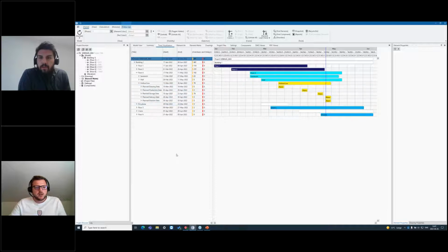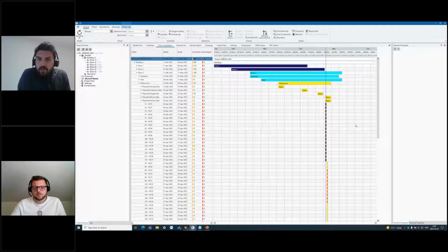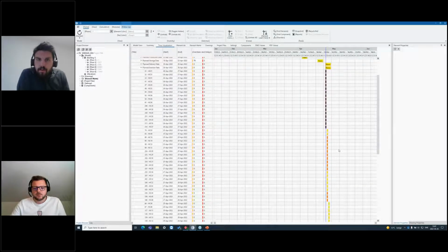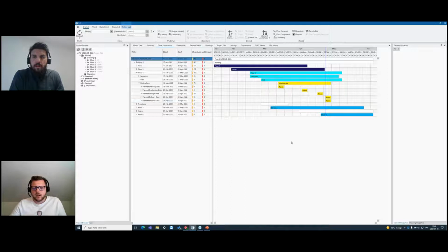And I can see also the status color changes the more you go into it. Maybe you have some of them that are not even started, yellow. Some of them are also this purple, maybe, so I don't really produce them. And it looks like, again, for every step ahead, it takes the color that represents the lowest status, if we want to say it like that. Exactly. That's correct.